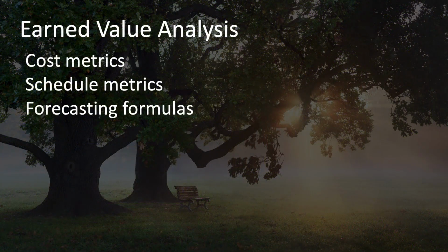More precisely, earned value analysis allows you to quantitatively measure cost and schedule progress using a standard method that is consistent for all projects and can be used to compare progress among projects. Also, to forecast cost and schedule even when ahead in one and behind in the other. For example, if your project is ahead of schedule but over budget, it could end early and under budget, or it could end early and over budget. How do you know whether it will be over or under budget? Earned value analysis can tell you.